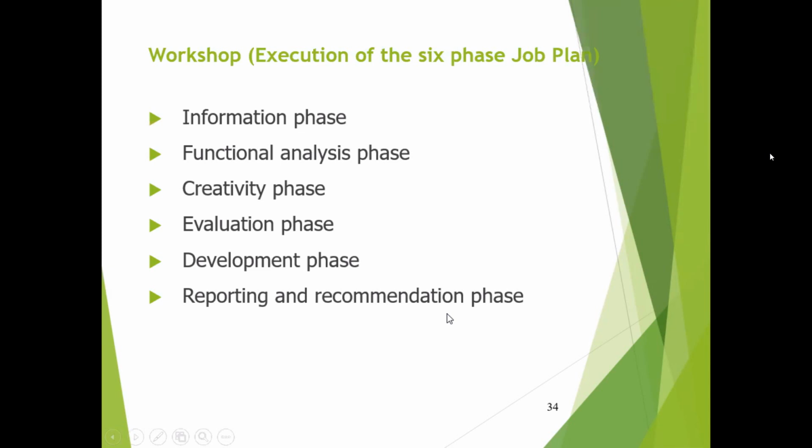Then we go to the actual workshop where there are 6 different phases or stages. Okay. Information phase, functional phase, and then creativity phase, then evaluation, development, and finally reporting and recommendation, right?